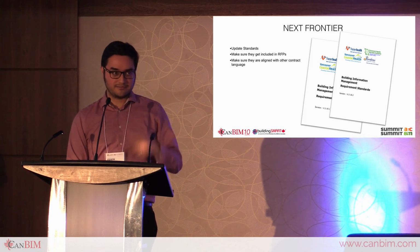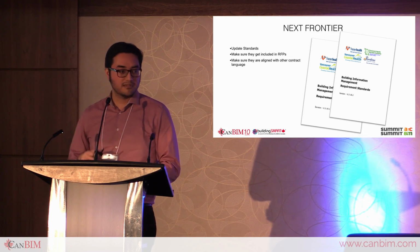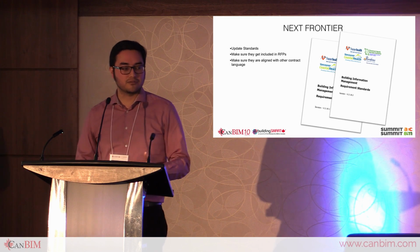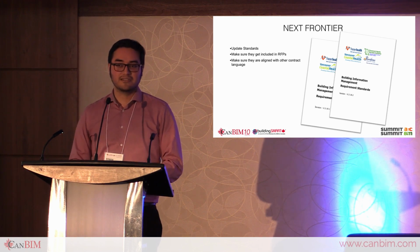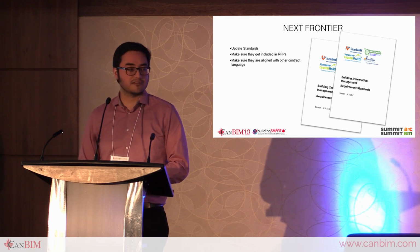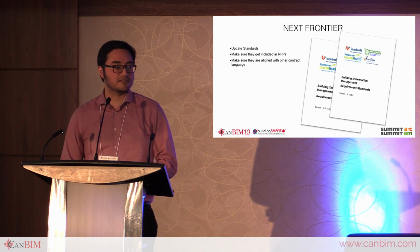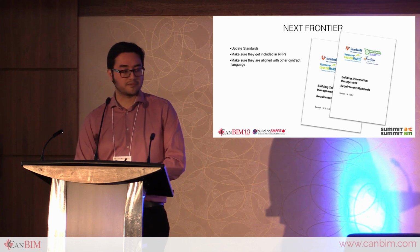There is a step where we have to make sure that if they're talking about as-built drawings and we're talking about record models, there's clarity about what we want. And if they're still being asked to deliver binders at the end of a project, and we're saying that it's all going to be done digitally, it's going to create confusion and additional costs potentially from the perspective of a designer or contractor.